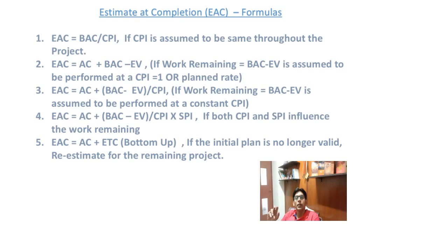A one-time cost variance could be due to unexpected delays in shipment and no further shipments are required, or an unexpected event, maybe a fire or an earthquake caused the closure of the office building for a week or so. This is also referred to as an atypical case.